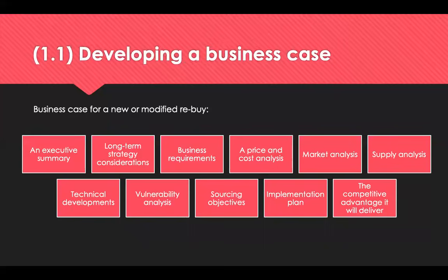A business case is a justification for undertaking an action. Its purpose is to seek approval and possibly finance for the recommended action plan. It should clearly identify the opportunity it seeks to exploit or the problem it's looking to solve, the benefits of that action, any risks and how they can be mitigated, the timescales for completing the project, the roles and responsibility of who's involved, and why something needs to be done, not just what needs to be done.